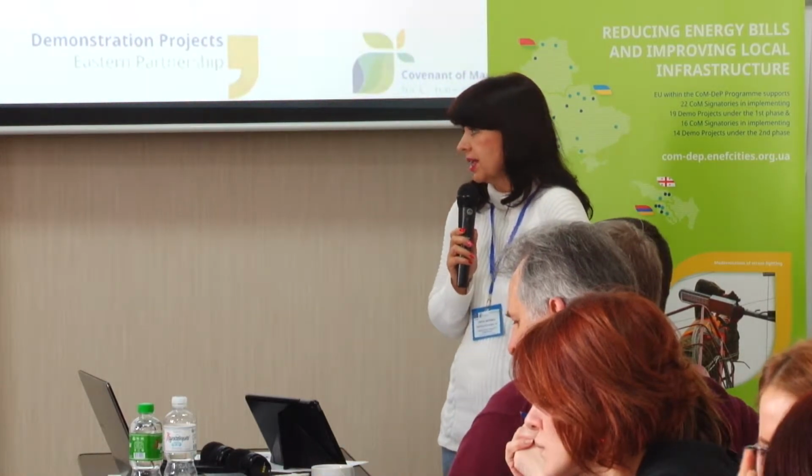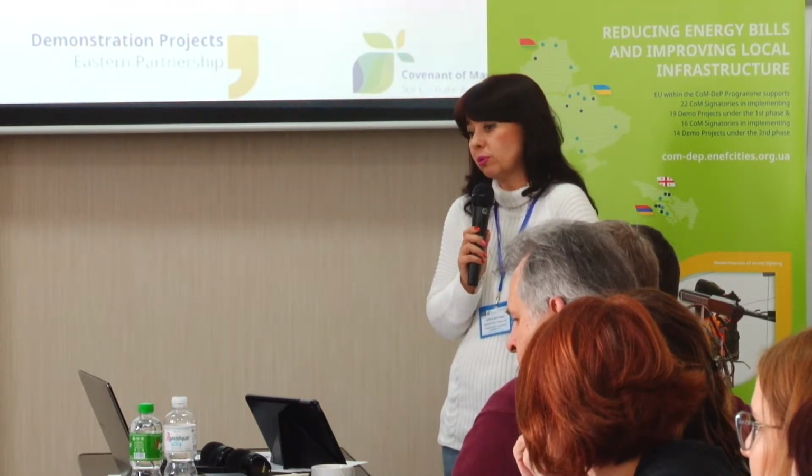If you don't arrange a good ventilation system, then your building in the nearest future will be transformed into a kind of fungi area, and it will be destroyed finally. Therefore, we had to include ventilation systems. We agreed with our experts, but we had to remove insulation of roofs from our buildings because this was postponed for the second phase of implementation.